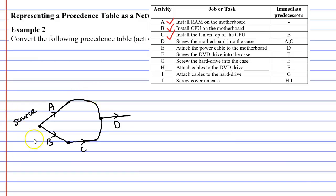As I mentioned in the previous video, the reason I don't like to draw my vertex straight away is because sometimes I end up extending these edges. So we'll tick off activity D and now move on to activity E. Activity E comes after activity D. So we need to finish activity D with a vertex and draw an edge to represent activity E and then tick off activity E on our diagram.